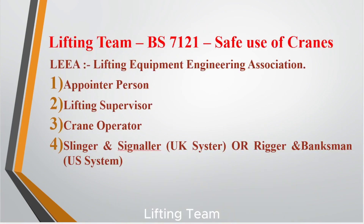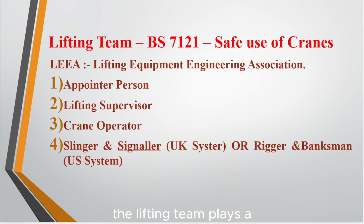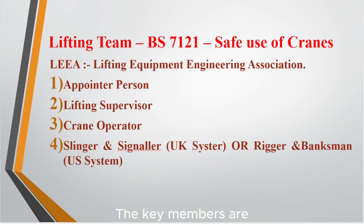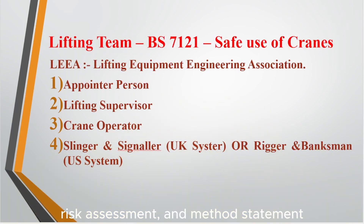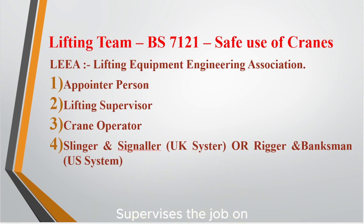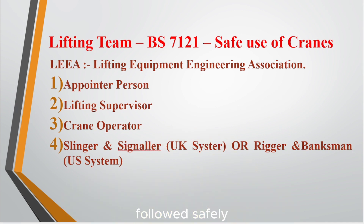Lifting team. In every lifting operation, the lifting team plays a critical role in safety. The key members are: Number one, the appointed person — responsible for planning the lift, preparing the lifting plan, risk assessment, and method statement. Number two, the lifting supervisor — supervises the job on site and ensures the plan is followed safely.